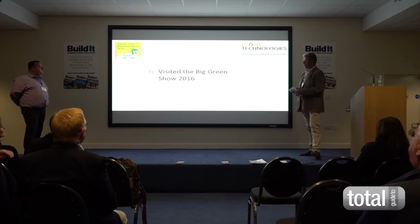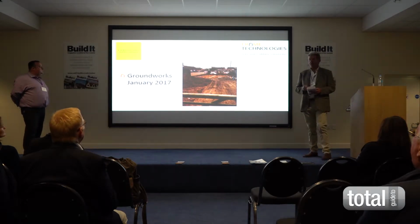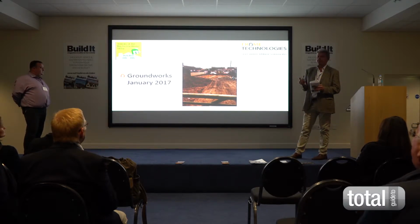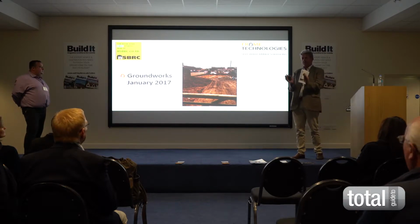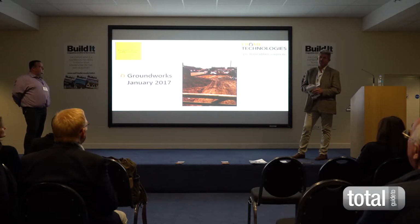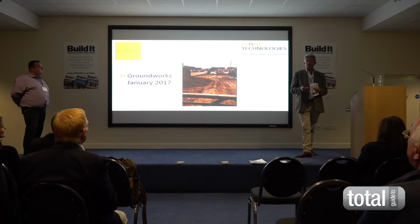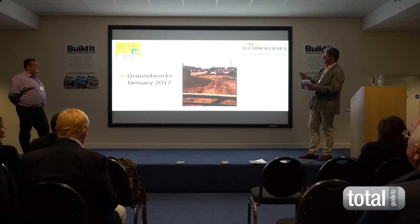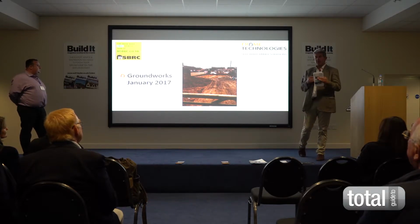So after Martin had been at the show in October, the order for the timber frame was placed in November, and groundwork started. One of the key things Martin was doing was building to a sensible program, but he left himself enough time in it. So many times you see programs that say we can build the house in a tighter period, but you don't allow any wiggle room if something goes wrong. We pre-booked back in October, into November, when he placed the order. He said, I want to be on site end of March. I said, you'll be on site at the end of March as long as that base is ready, because I can't supply it on skyhooks. If the base isn't in, we won't be able to install it. He said, it will be ready. So he started the groundworks in January for the timber frame at the end of March, and left himself quite a lot of time.